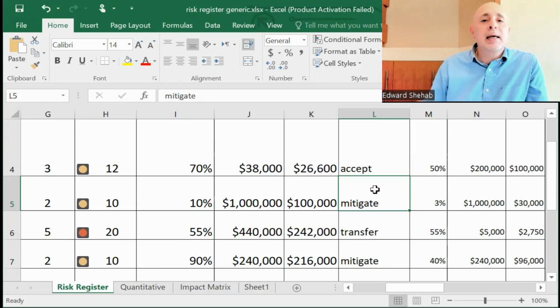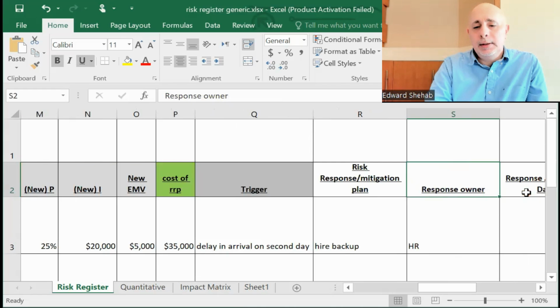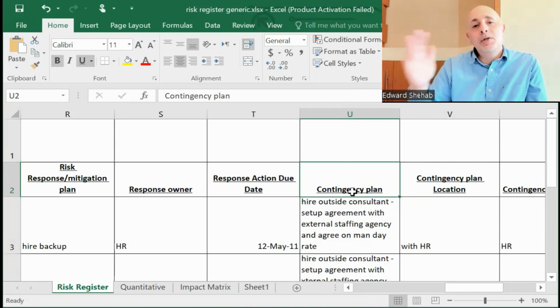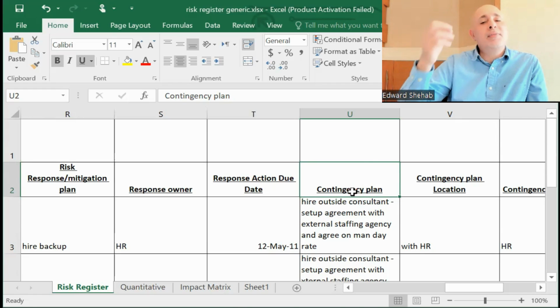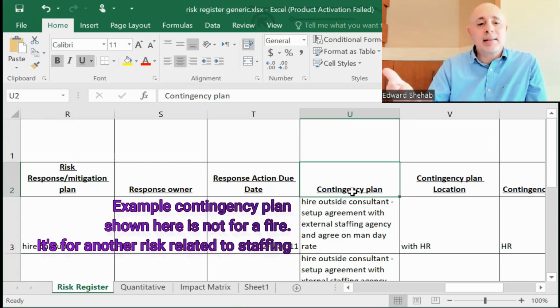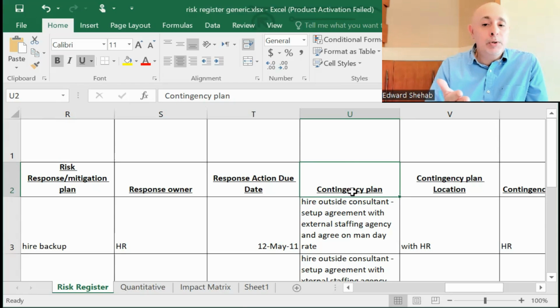And for the residual risk, you need to have a contingency plan. So if I show you on my Excel sheet to the right of this, on this side here, the contingency plan right here. So for all the risks that have remaining risk, you'll need to have a contingency plan, which is your backup plan in case something happens. So in case of fire, the alarm goes off, that will be your indicator. And then that indicator tells you you should act on your contingency plan, which is typically leave everything and run down the stairs, do not use the elevators, right? So that's your contingency plan.